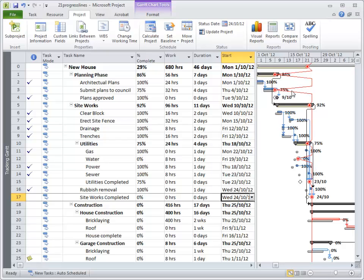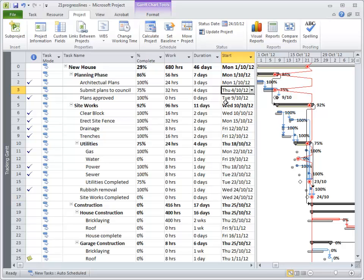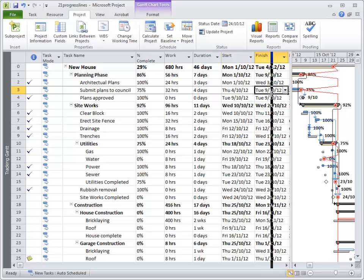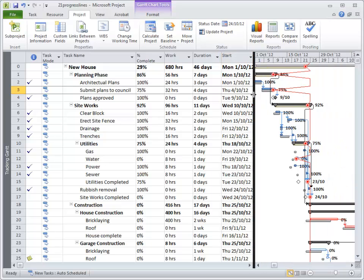So we can see here that if it's really the 24th of October, the 'Submit Plans to Council' — let me make that wider — should have been finished by now. Now it hasn't, as you can see there, so the progress line is showing that slipping.